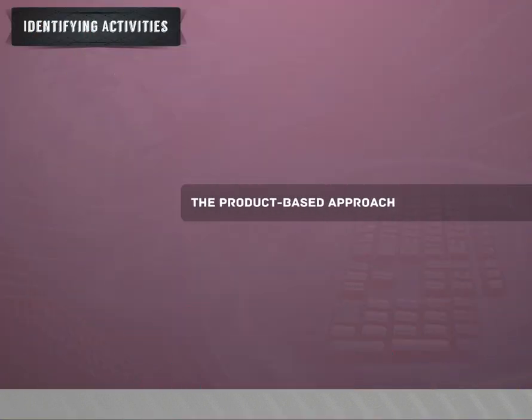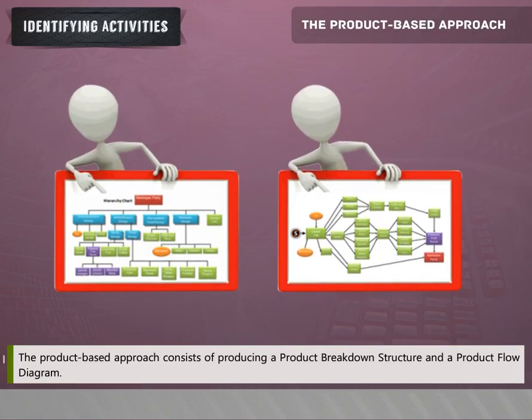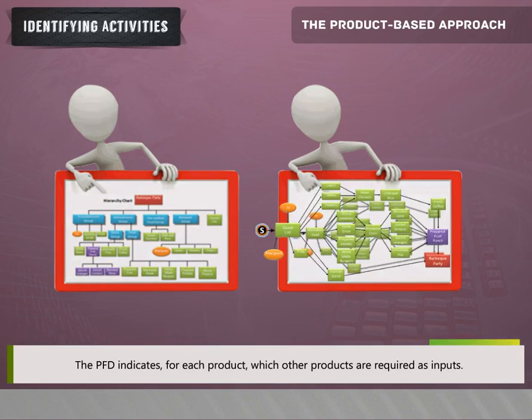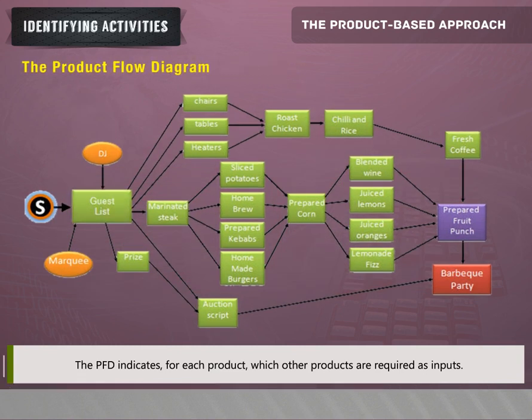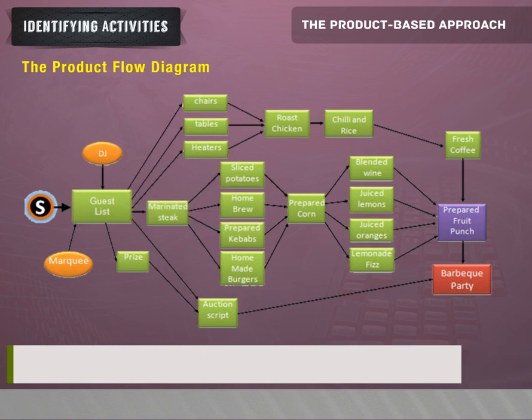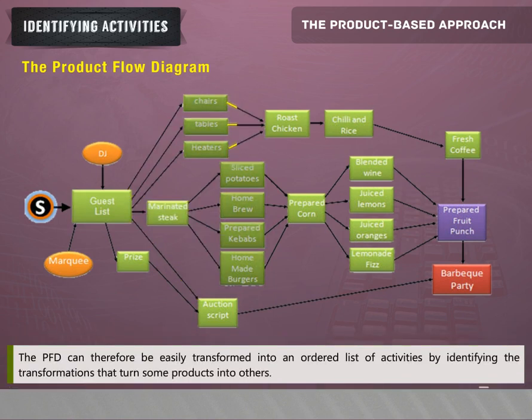The product-based approach. The product-based approach used in PRINCE2 and Stepwise. The PFD indicates for each product which other products are required as inputs. The PFD can therefore be easily transformed into an ordered list of activities by identifying the transformations that turn some products into others.